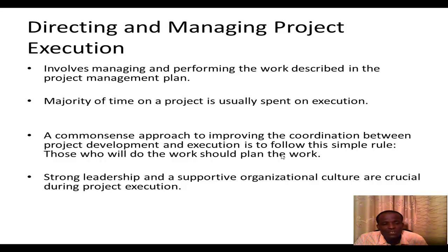Now, the majority of the time on a project is usually spent on execution. And so, a common sense approach to improving the coordination between project development and execution is to follow this simple rule, that is, to as much as possible get those who do the work on the project to also plan the work. Again, strong leadership and a supportive organizational structure are very crucial in the successful execution of projects.